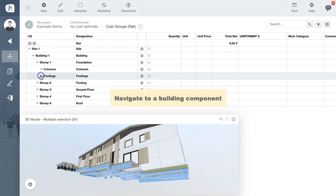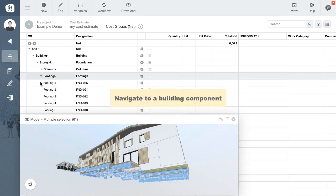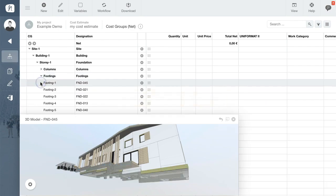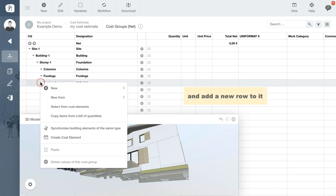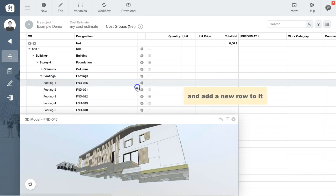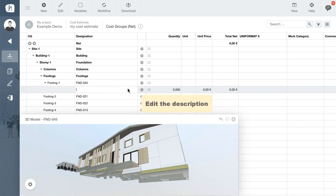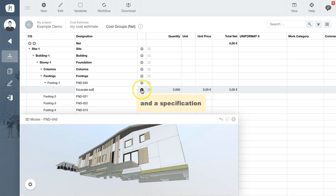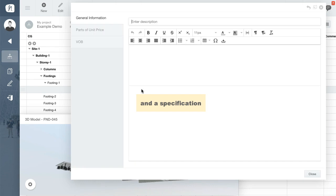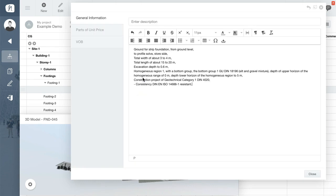Let's create our first cost element. Navigate to a building component and use a right-click to add a new row. Under Designation, enter a description of the work item and then use the gear icon to add a longer specification.